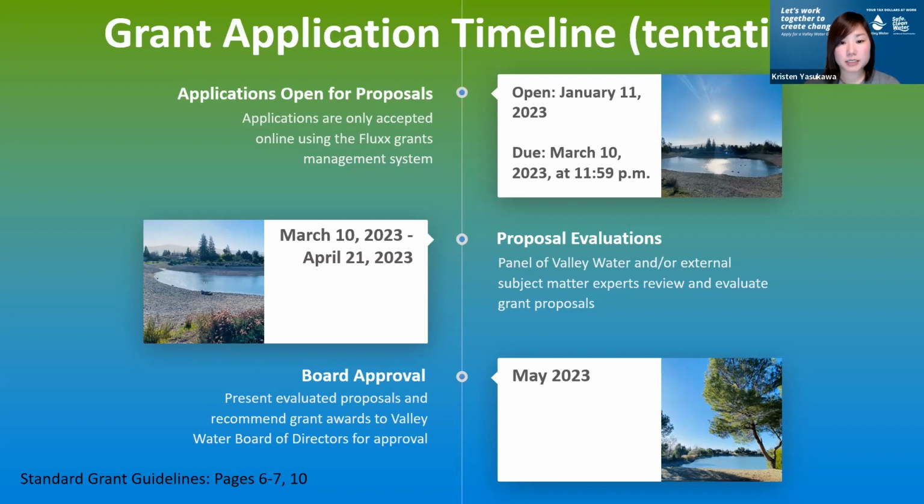For direct costs, we typically don't include any markup. You show the receipt and we'll pay that out. For labor cost, we do allow reimbursement for up to 20% of benefits on top of any actual pay rates, and then a 10% overhead on top of that. But that's only applied to any labor hours from employees of the grantee organization.